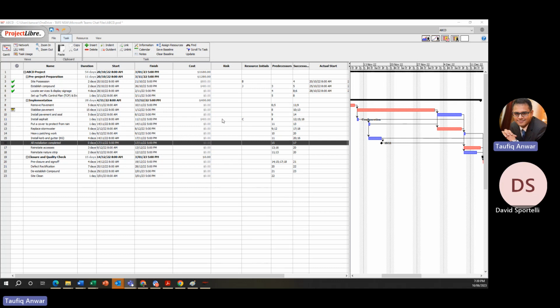So for instance, having to select a vendor who is going to deliver the project can be a milestone, because you have worked so much. You go to the market, get a couple of vendors with their proposals, and evaluate them, not just yourself, but the procurement team with IT, product, marketing, sales, customer service, all of them. You figure out whether they meet all the requirements, and then you select the vendor. That's a big thing. Get the contract signed and everything.